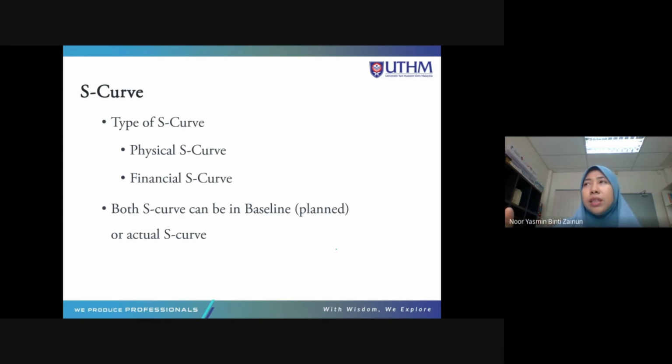Okay, correction. Take the latest, meaning when it is really complete and you think that is the best activities WBS that has been done, then you set it as the baseline. That will become your plan, even though you have draft 1, draft 2, draft 3. For example, if you have a final version, draft 5, set draft 5 as your baseline. It will become your planning.